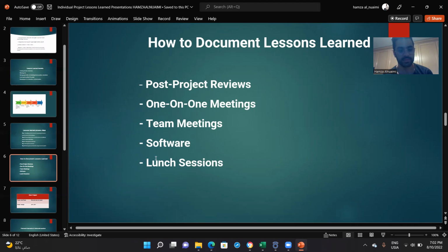Lunch sessions. Team meetings help only team members, but lunch sessions have a larger audience. You conduct this session during lunch and let team members from other projects in your organization join in. This helps share knowledge across different teams. Lunch sessions are informational meetings that can be very useful.